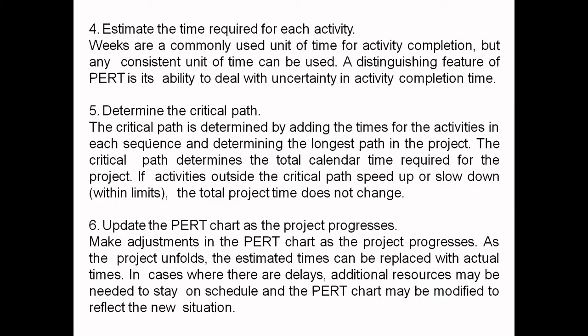Estimate the time required for each activity. Weeks are the commonly used unit of time for activity completion, but any consistent unit of time can be used, as per our wish. You identify which unit you are using; it can be one week, it can be one month. It is up to us. A distinguishing feature of PERT is the ability to deal with uncertainty in activity completion time.